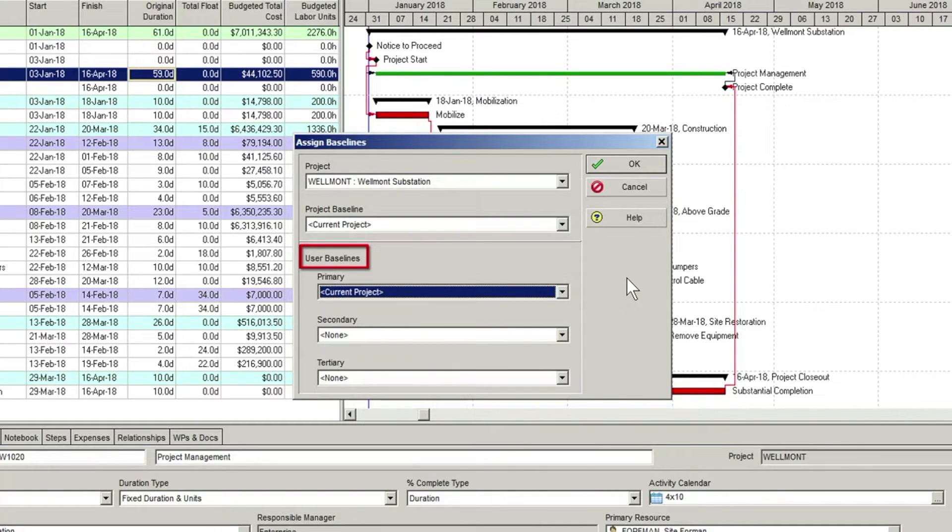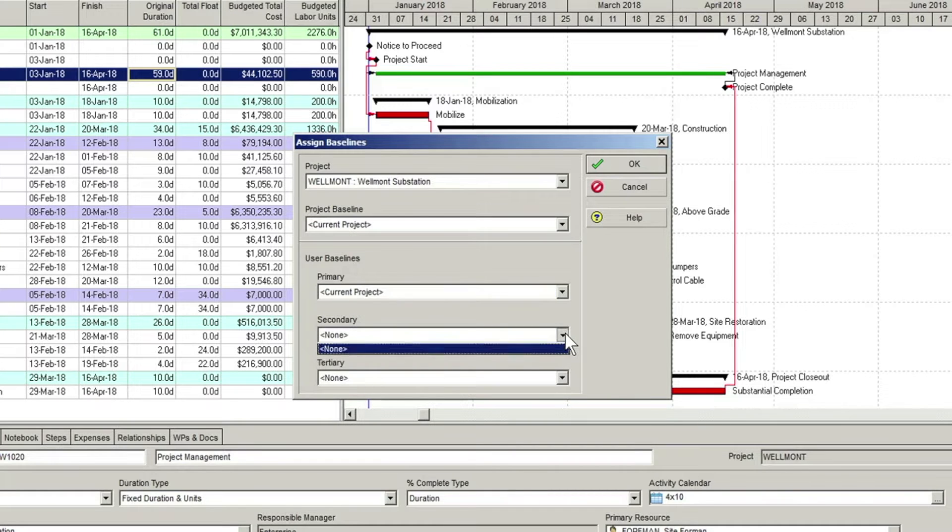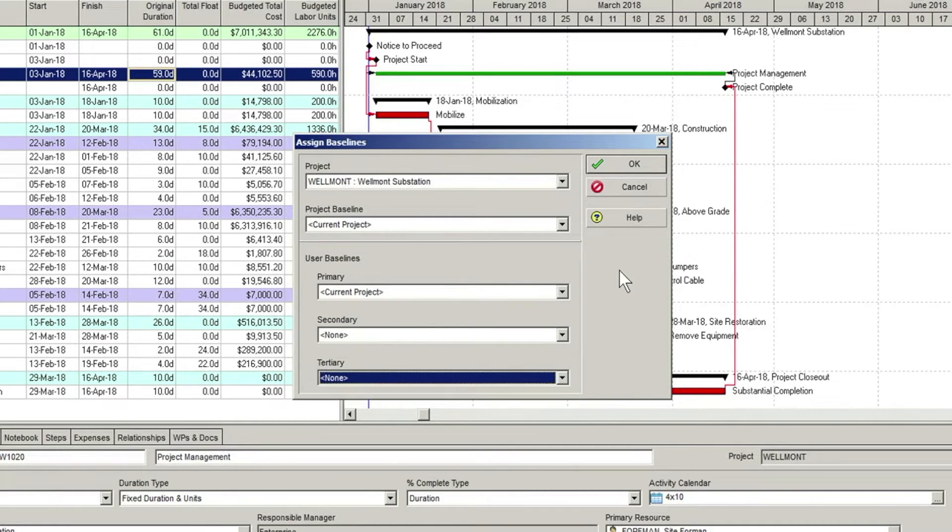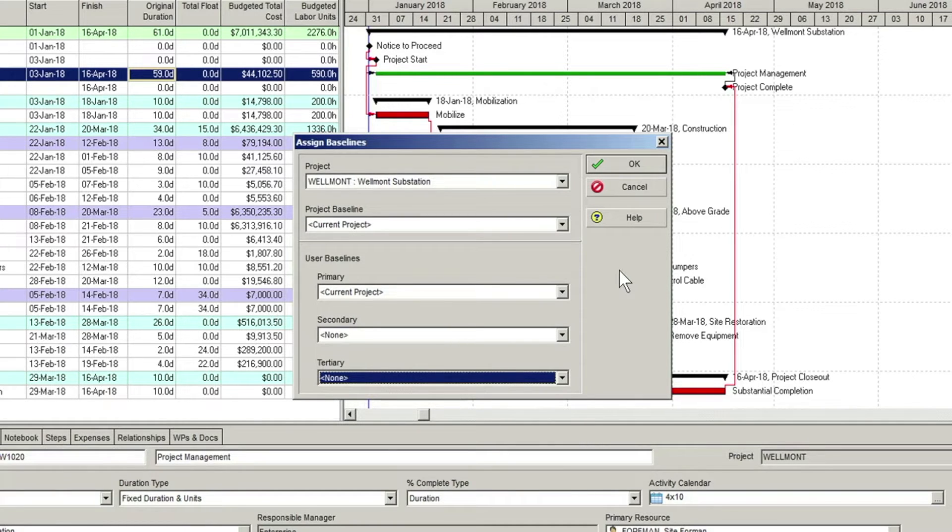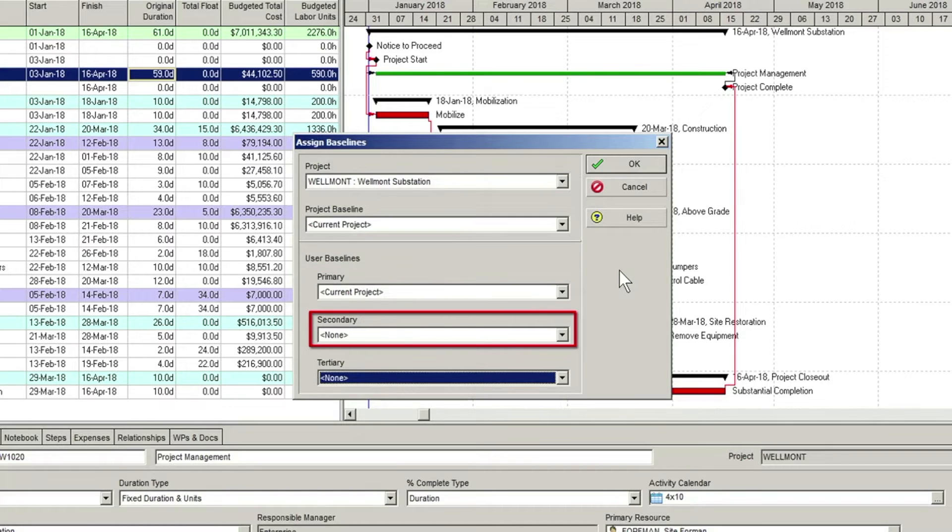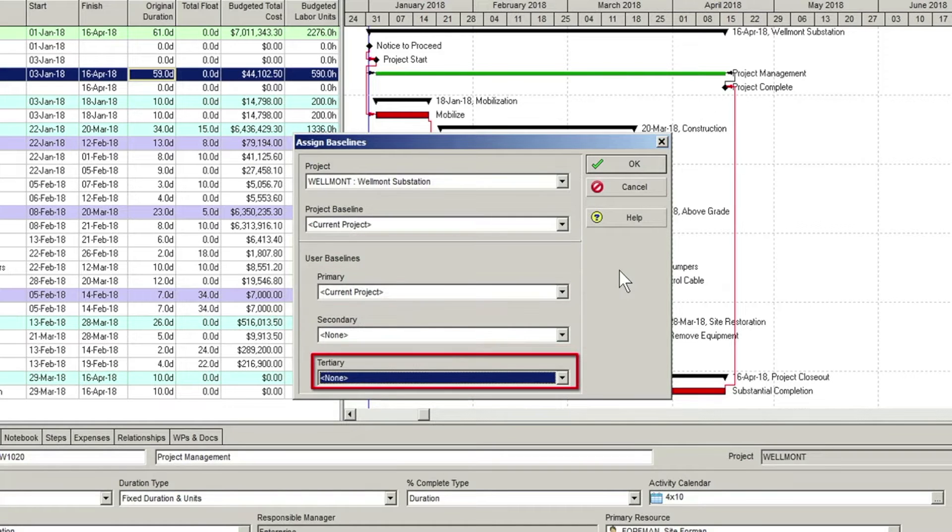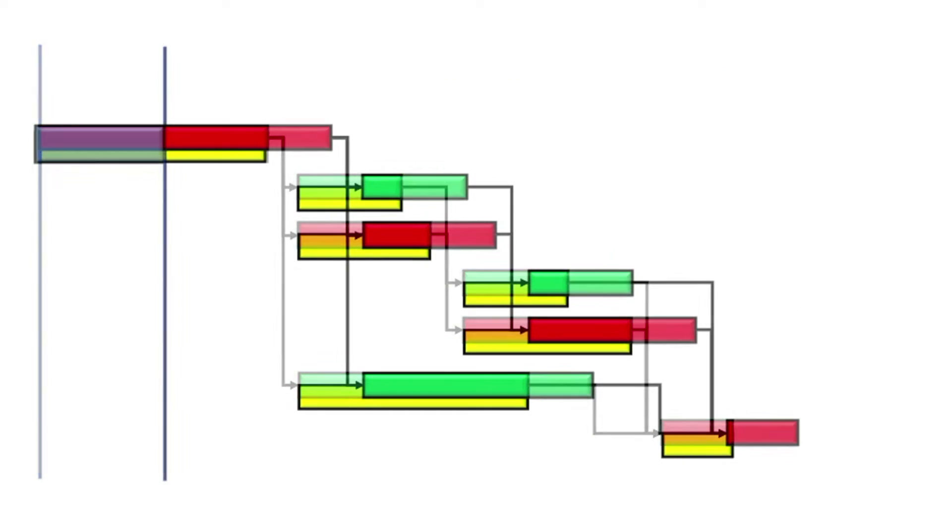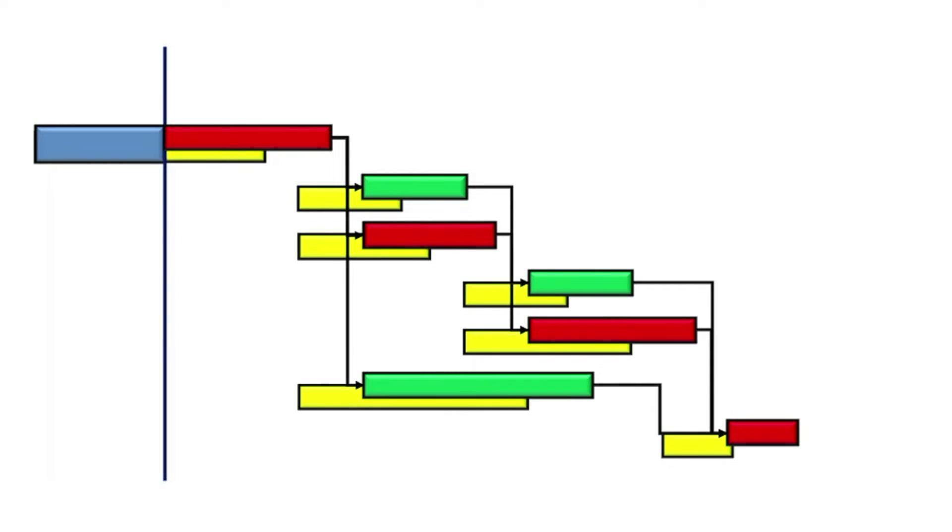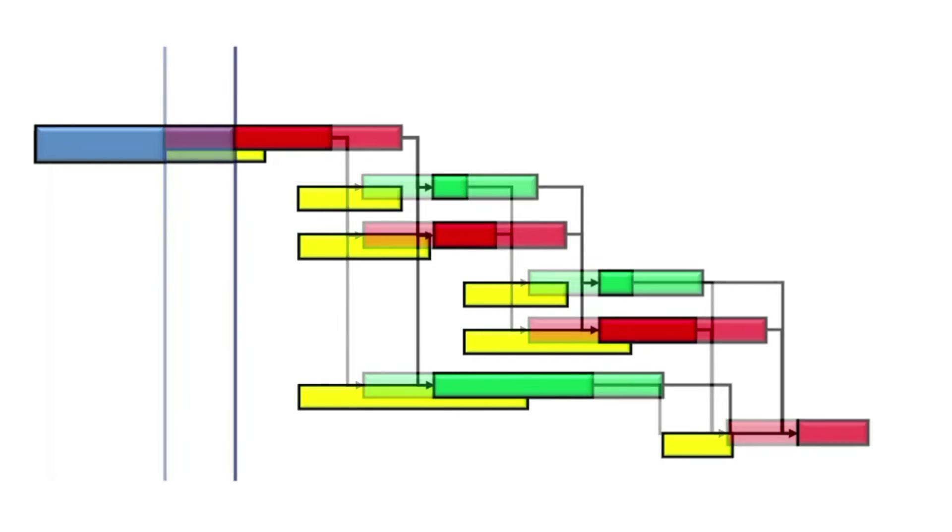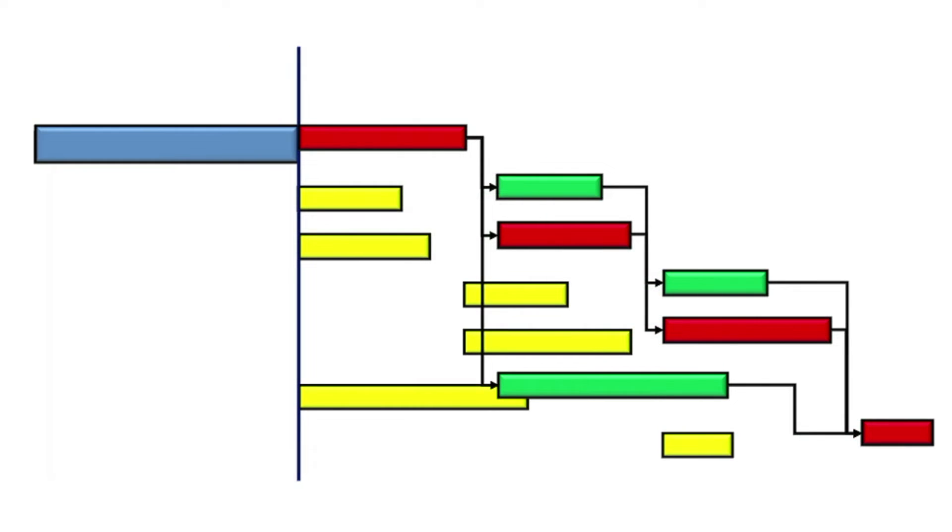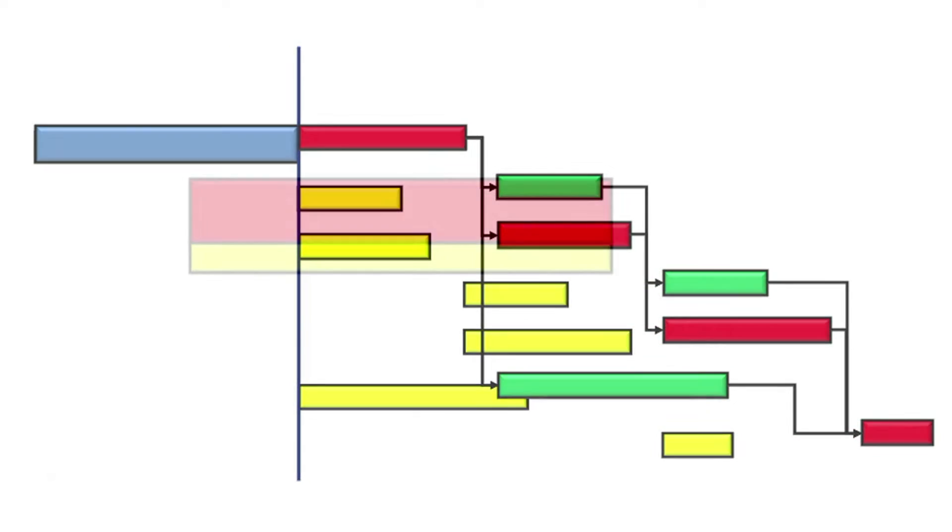User baselines can be used to display more ad hoc snapshots of the project at various stages of its execution. You can assign up to three user baselines: primary, secondary, and tertiary. When you create a baseline and assign it to your project, it functions as a frozen copy of the schedule that doesn't change.